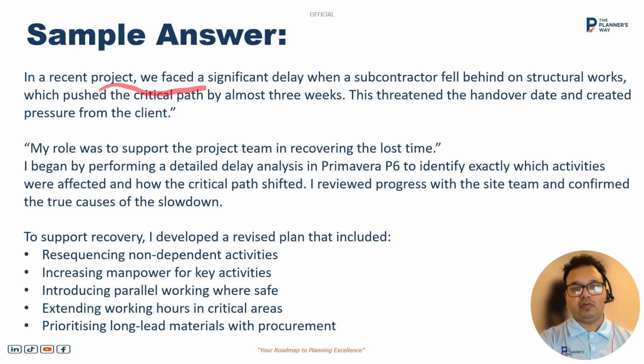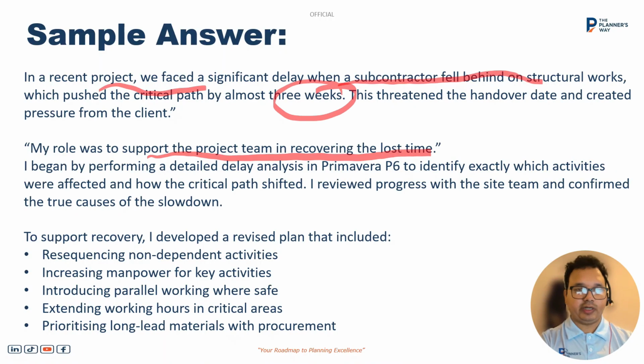In a recent project, we faced a delay with a subcontractor. His program fell behind on the structure work, and that pushed the critical path almost 3 weeks. Because of that effect on the critical path, the handover date was pushed 3 weeks, and that created pressure from the client, and the subcontractor needed to bring the project back on track. So my role was to support the project team in recovering the lost time.